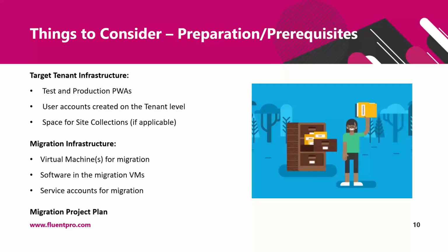And also, as part of preparation, you would want to create a migration project plan. Before the migration starts, create a draft plan first, listing all necessary migration activities. And before a test migration is completed, this plan will contain estimated durations and efforts. Once test migration is completed, the plan can be adjusted based on empirical knowledge about the environment, migration speed, and specific issues of the data.